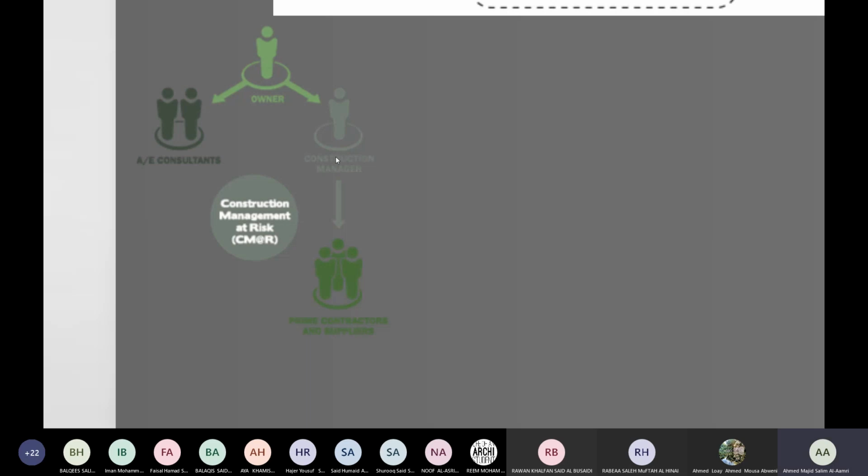Once again, if there is a typical project, one project, then one contractor is going to be sufficient. If you are having many contractors, then there should be one above the contractors, whatever we call it, as a construction manager. For example, when we talk about the project of a villa, do you think one contractor is sufficient? Okay. So in that scenario, I don't need to bring a construction manager because I was being there as a project manager. Are we clear?